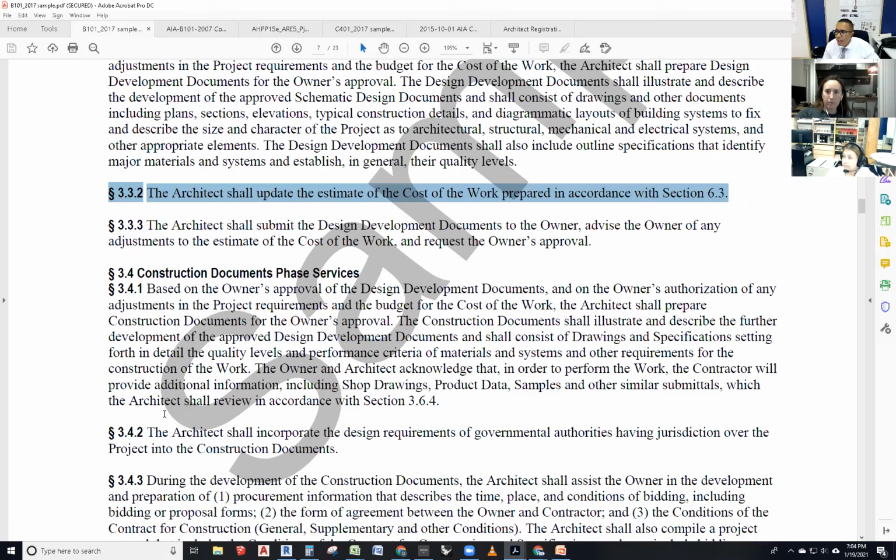Turns out we did before. We just happened to have added a helipad to our project because the owner had a $5 million budget and the estimate for the cost of work at schematic came at $3 million. We added a helipad and now we're detailing that helipad, and it turns out that we're at $5.5 million here because we know much more about it. This is much more accurate. We know the systems and assemblies, and we recommend the owner adjust their budget by $500,000.